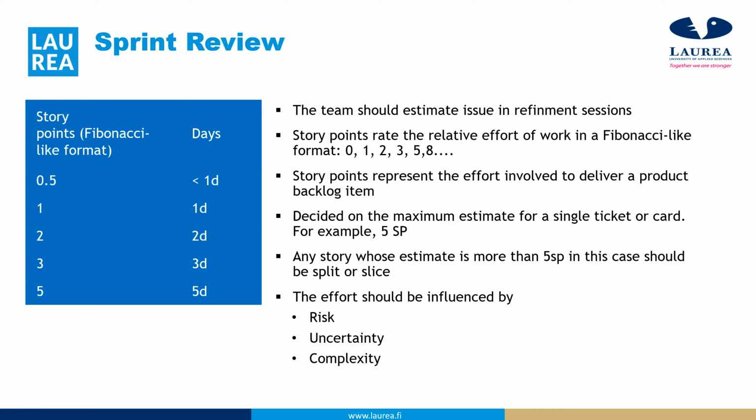Then this is actually story points. I will change this to be the title, supposed to be story points estimate. So when you write stories, you need to be able to estimate them. Some teams estimate this in hours, but the Fibonacci format sequence has proven to be much more effective, and so that is what most teams use.